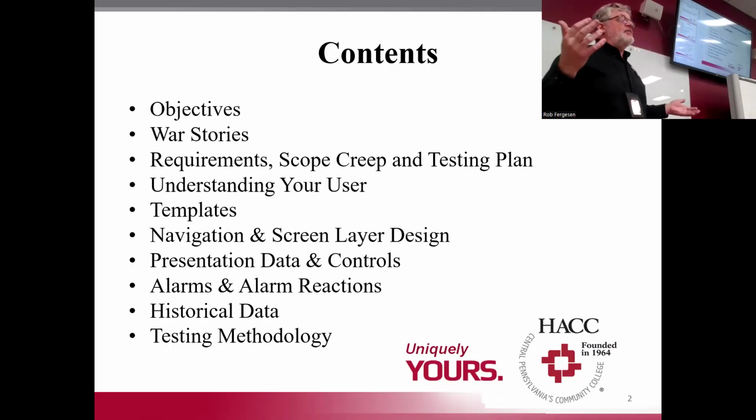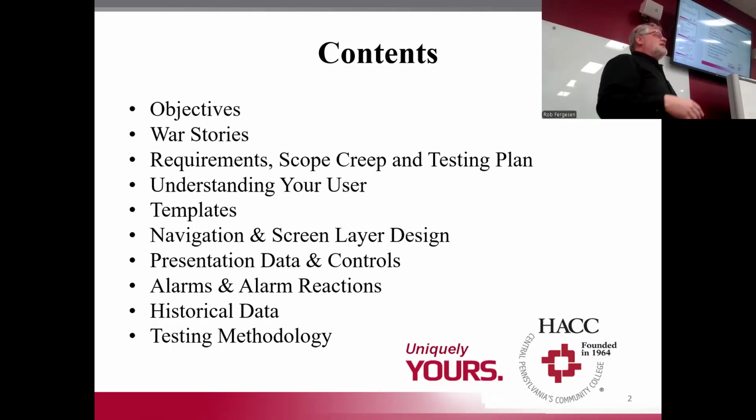That creep kills projects. You might say, oh, they just asked for this little thing. This little thing, though, requires extra testing. It may actually cost more in terms of extra hardware, software. And if you keep adding one little thing after another, you find that in the allotted time, there's no way you complete the project. So you really have to watch out for scope creep.